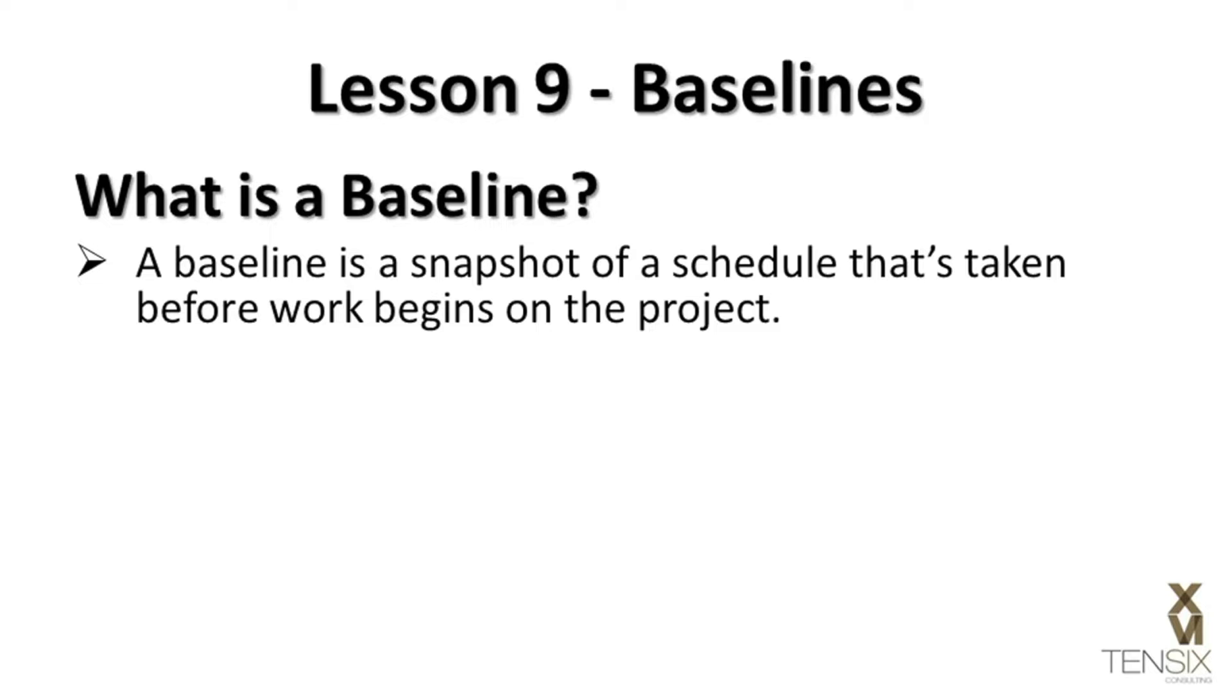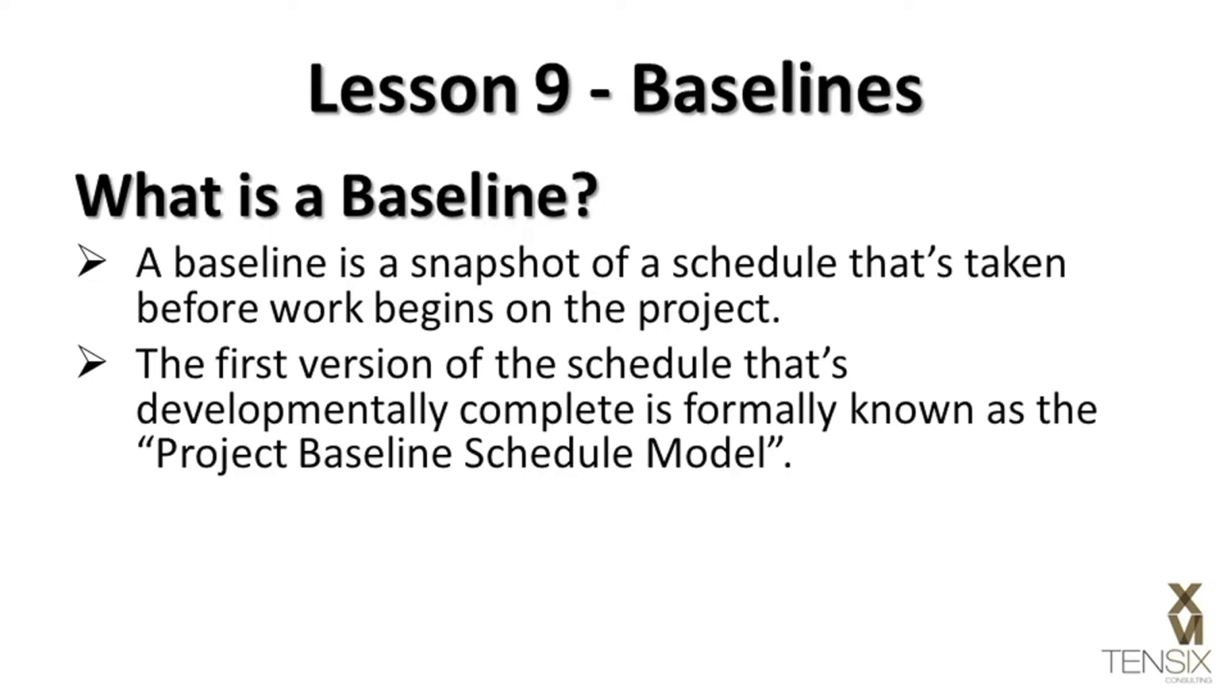According to the second edition of the PMI's Practice Standards for Scheduling, the first version of the project schedule that's developmentally complete is formally known as the Project Baseline Schedule Model.